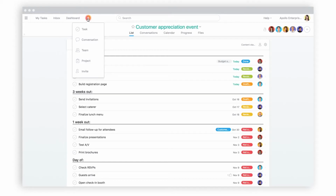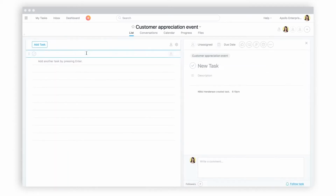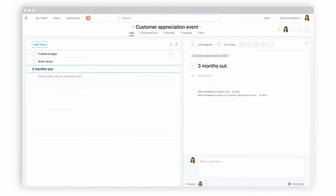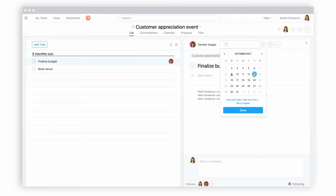One of the things I love about Asana, you have different aspects that you really like, using it and the team using it in your capacity as leading operations. But from my perspective, I love to be able to go in and just see the RAG status, or for those that don't use the terminology, red, amber, green, how projects are actually meeting deadlines and which ones are at risk. So which ones are red, actually behind project status, which ones are amber, maybe at risk of meeting the project deadlines, and those that are green, which are obviously well in time to meet their project deadlines. So for me personally, I love the RAG status functionality within Asana. It really works super well to be able to take a snapshot and understand where the risks are in the business.